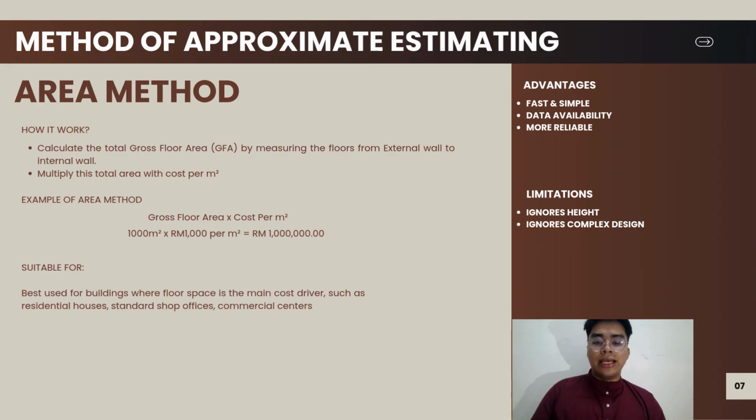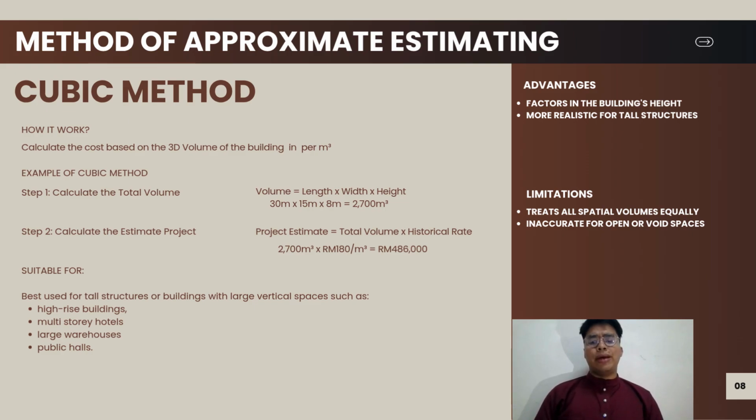And the limitation is it ignores complex design. It treats all square meters equally, so it cannot account for premium materials, intricate architectural shapes, or specialized structural engineering requirements. Finally, the cubic method.